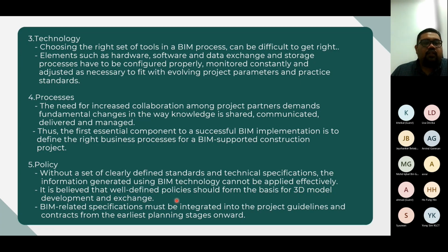And then the next one is the policy, which is the BIM standard. Without a clearly defined standard and technology spec, the information technology cannot be applied effectively. It is a belief that well-defined policies should form the basis of model development and exchange. So the spec must be integrated into the project guidelines and contracts from the earliest planning stage onward.